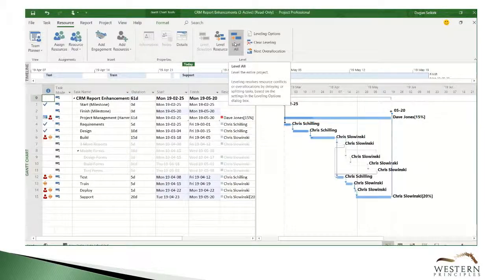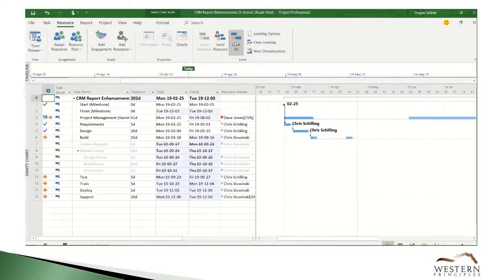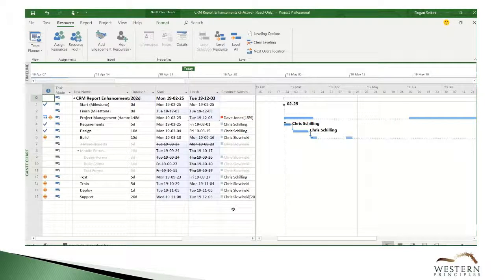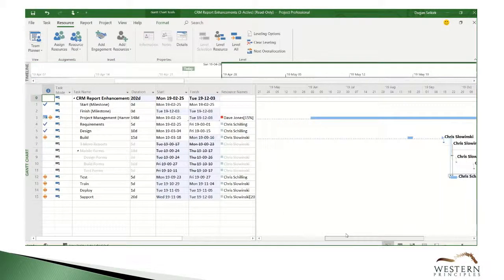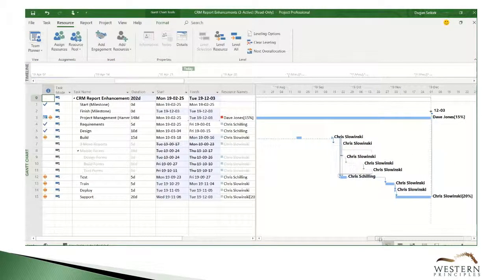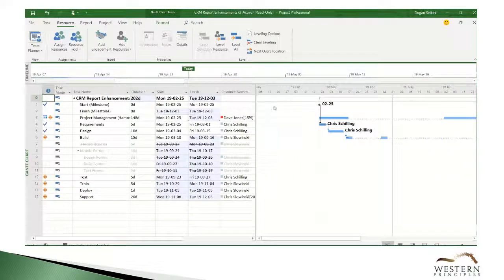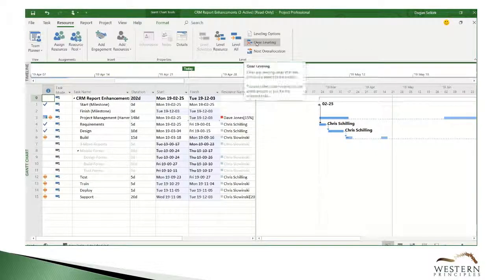The fastest and least efficient method is to simply level the entire project schedule, task by task and resource by resource. As you can see, that stretches out the project significantly and moves our completion date from May to December. So not ideal.